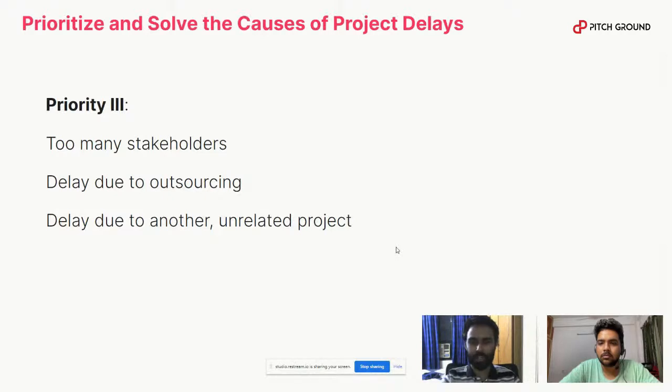We have to ensure that these stakeholders are grouped properly, so that two or three of them might be giving feedback on how the content is being taken up, and two of them might be giving feedback on how the design is being taken up. So you have to get them on calls and set these roles for them. But we found that it can be tackled a little bit by educating the client, and by encouraging internal discussions among the stakeholders so that they give you consolidated feedback.